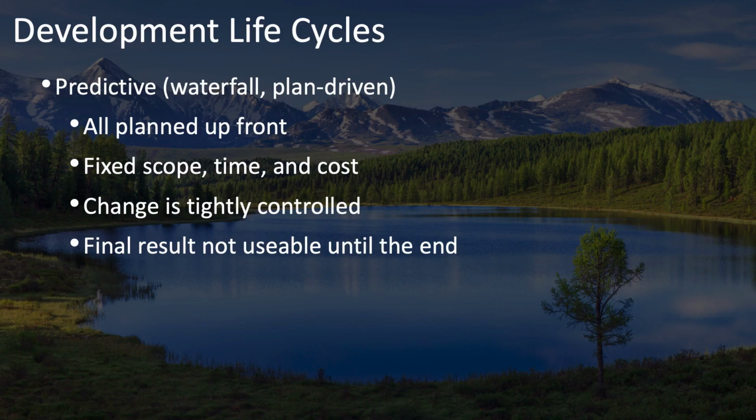So because these have such hard breaks, they're often depicted as phases that flow one into the other like a waterfall. This waterfall approach is what has traditionally been used and is still often used for projects that are pretty predictable and don't have a lot of uncertainty involved. Things like designing and building a house or a building or a bridge or a freeway. These are very well established disciplines and industries in which they have a lot of experience, and it's reasonably predictable what it's going to take to accomplish these ends.